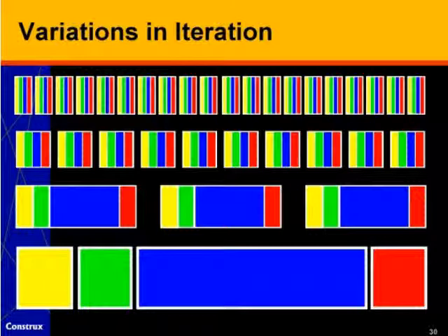The top row in this slide is really the highly iterative approach, such as pure Scrum or extreme programming. We could possibly go to longer iterations and a smaller number of iterations, as shown in the second row. We could possibly go to an even smaller number, such as 3 iterations, as shown in the third row. With that few iterations, we typically would be describing that as something more like staged delivery than extreme programming or Scrum. And I hope you can see the pattern that by the time we get down to the bottom row, with 1 iteration, we actually have a waterfall model.